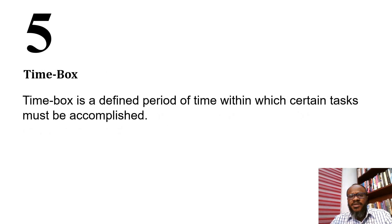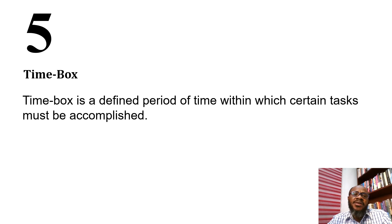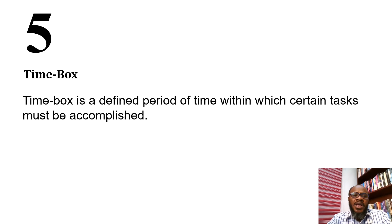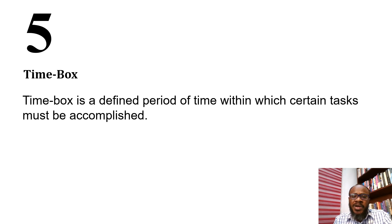Time box is a defined period of time within which certain tasks must be accomplished. In agile, several things are time-boxed — for example, a sprint time-boxed to two or three weeks means the end goal of that sprint must be fulfilled within that period. The reason we time-box is so the team maintains a steady pace and organizes itself to achieve the end goal within that period.